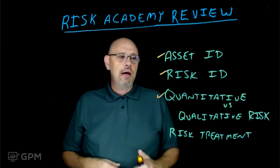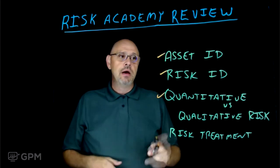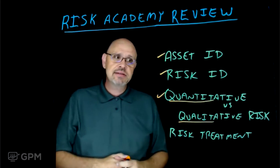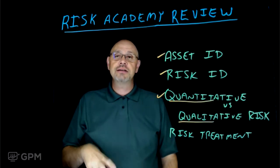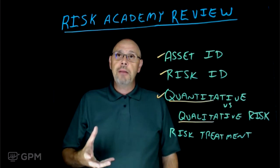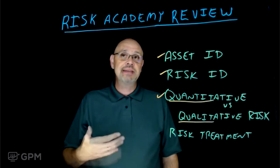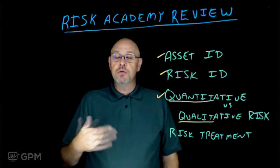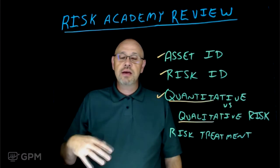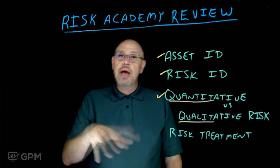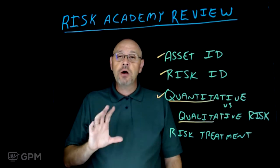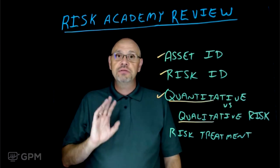Then we talked about different ways of categorizing risk — quantitative versus qualitative risk. Quantitative tries to get to something called an annualized loss expectancy, a dollar figure. Qualitative risk is your subject matter expert's best guess — sometimes listed as low, medium, high, or critical. We also talked about semi-qualitative, where you rank everything on a scale of 1 to 5 or 1 to 10 and come out with a number. That's about categorizing your risks, and it helps you identify the things most important to address first.